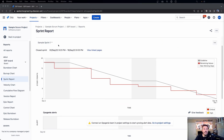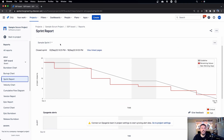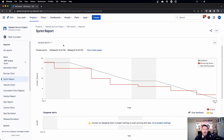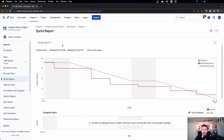What you'll notice is you can change the sprint from which the report is generated, but you can't change the value — you can't change it to story points, original estimate, or issue count. It's only story points, so if you're not using story points, you're out of luck; this report won't do you any good.